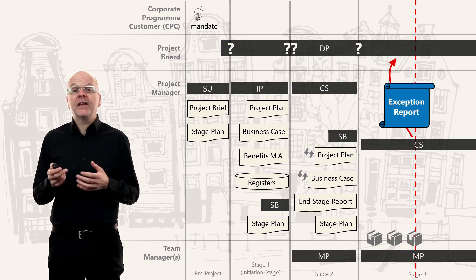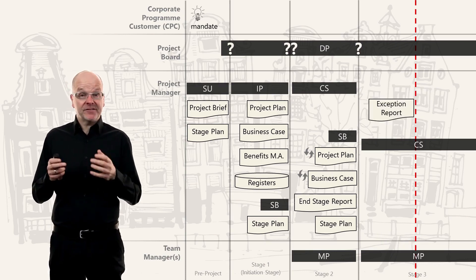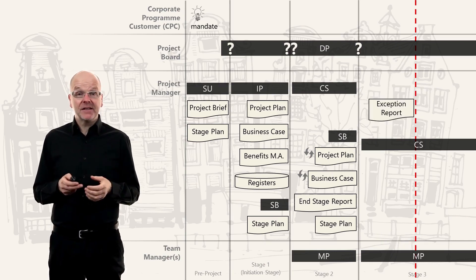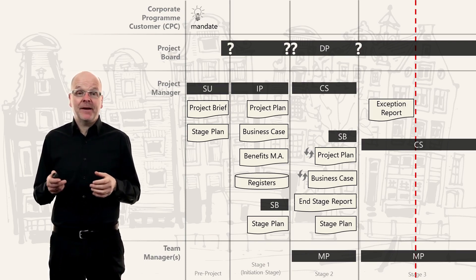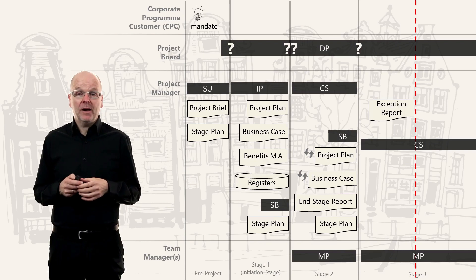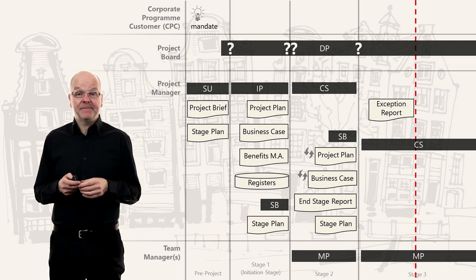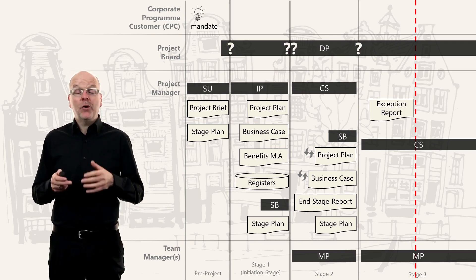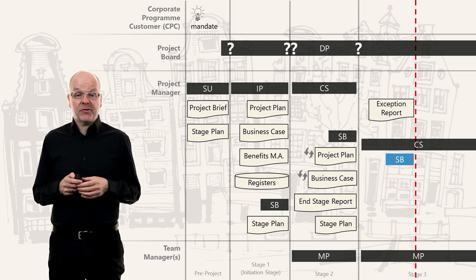The project board will come together to discuss the exception report, and the project manager waits for their response. The project board can decide to stop the project — for example, if lots of issues like this are happening, they might say enough is enough. Or they can ask for a new stage plan.